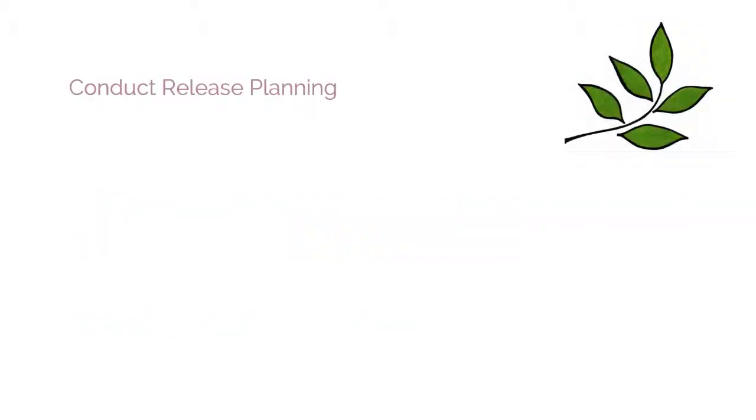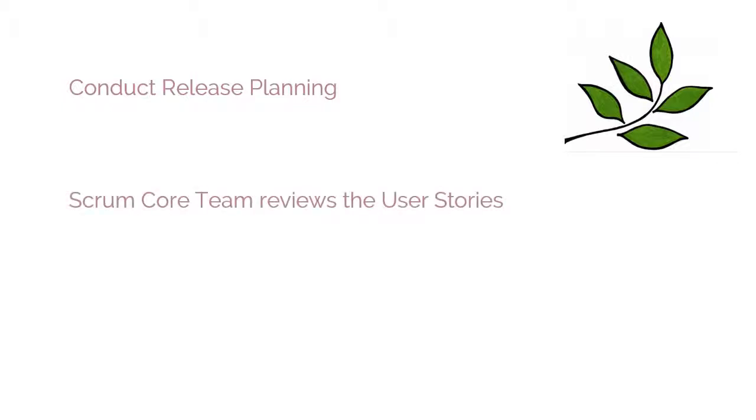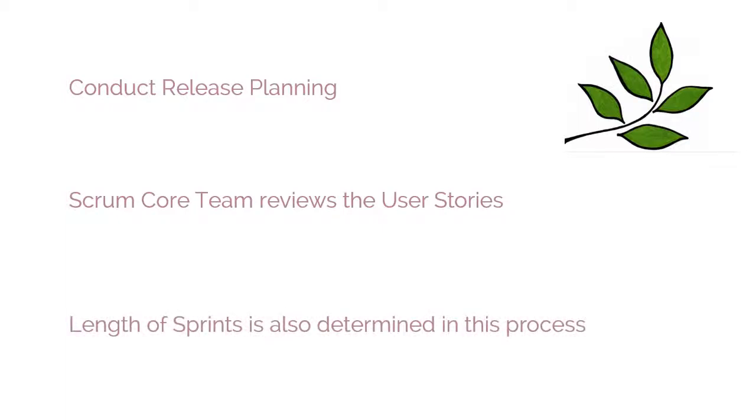The sixth and last process in this phase is the Conduct Release Planning process. In this process, the Scrum core team reviews the user stories in the Prioritized Product Backlog to develop a Release Planning schedule, which is essentially a phased deployment schedule that can be shared with the project stakeholders. The length of sprints is also determined in this process.